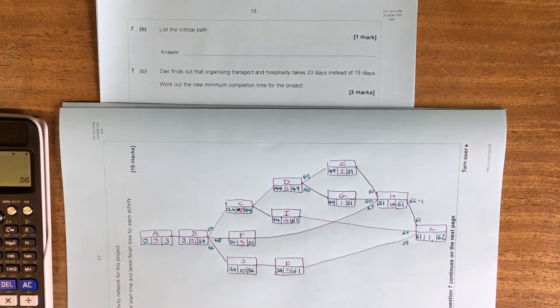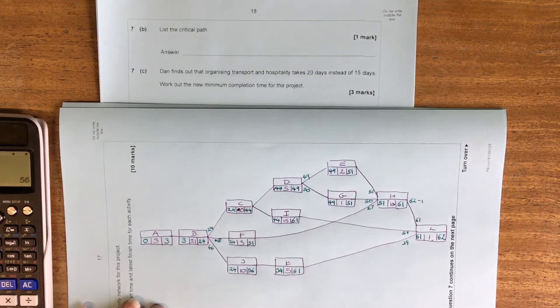We're now asked for our critical path. So these are the critical activities. These are the things that have to start on time so that they can finish on time.